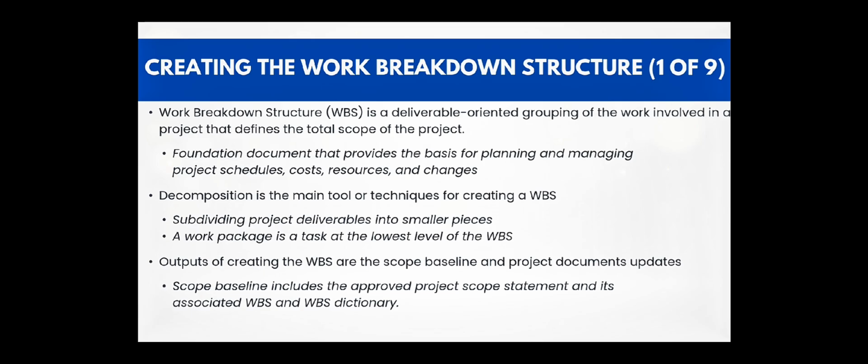Work packages are the smallest tasks in the project's work breakdown structure that the project manager directly monitors and controls. Their size depends on the project timeline and reporting frequency. A work package can also represent the procurement of specific products. Importantly, a work package must be defined clearly enough for the project manager to estimate effort, cost, and assess the quality of the completed work.